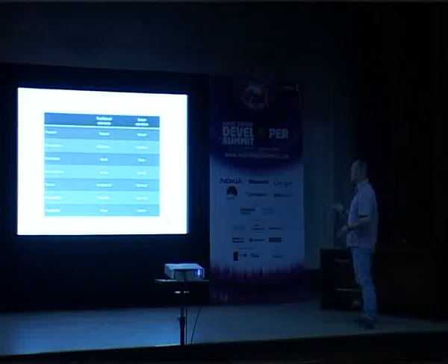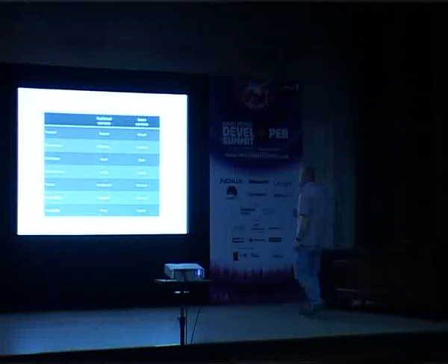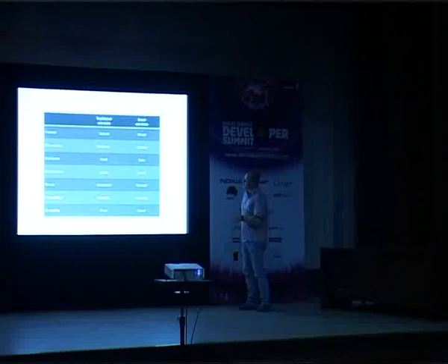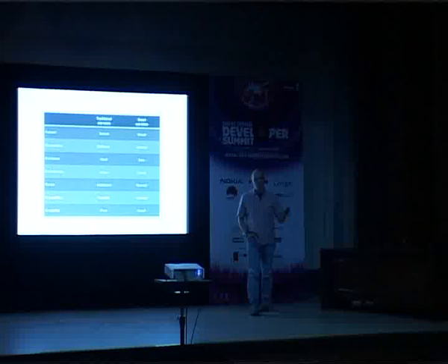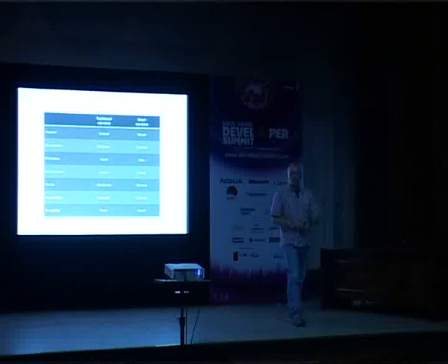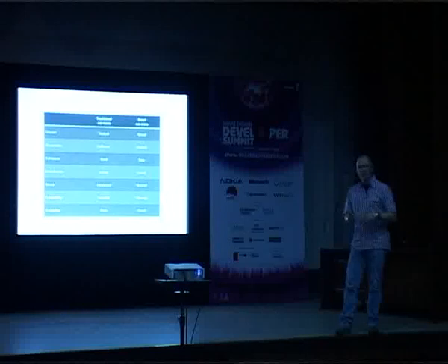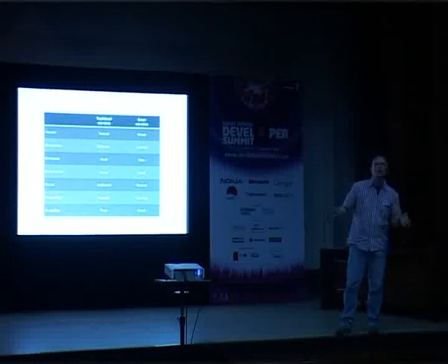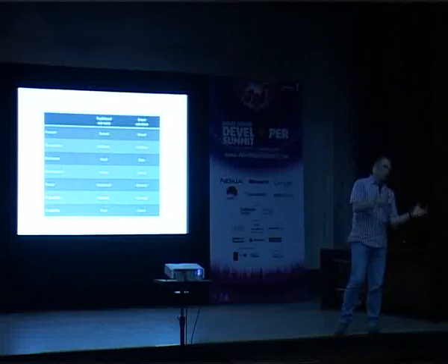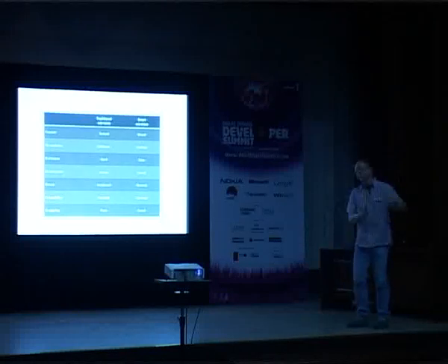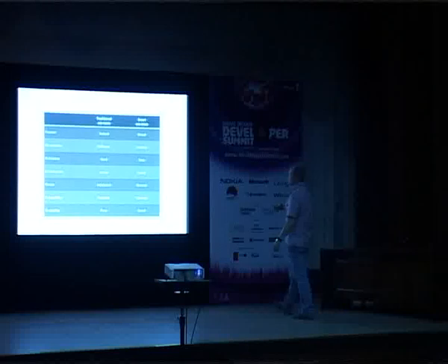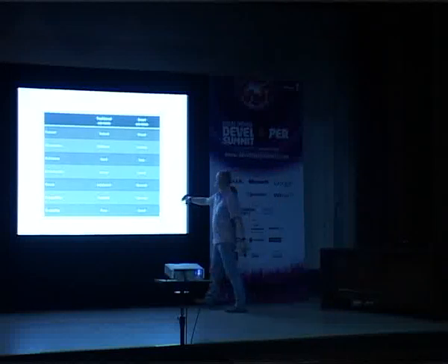For developers, for testers, it's the same, by the way. And also, if you look at the size of these different smart use cases, they're more or less always the same. Instead of that, if you have user goal level use cases, one could be really complex and hard to implement, like the change address that I had earlier. But in the same project, there could be a use case called login, which is far easier. So they're not on the same scale. And with modeling smart use cases, you can be on the same scale with all your use cases, which means they're much easier to estimate.